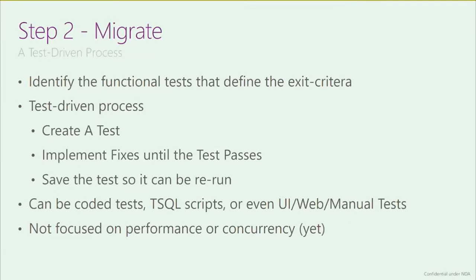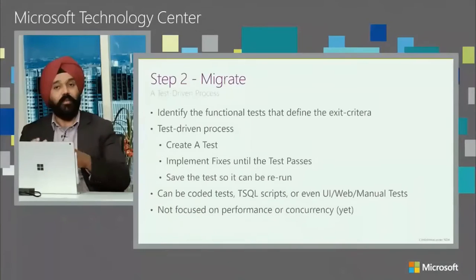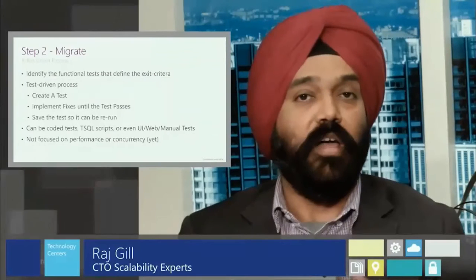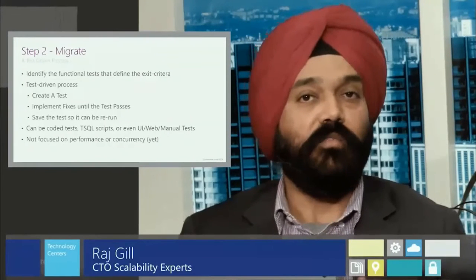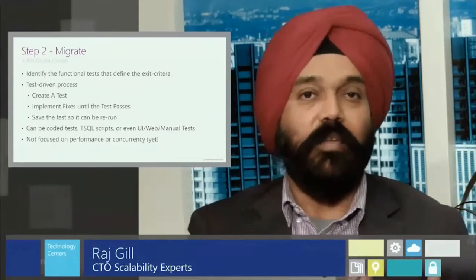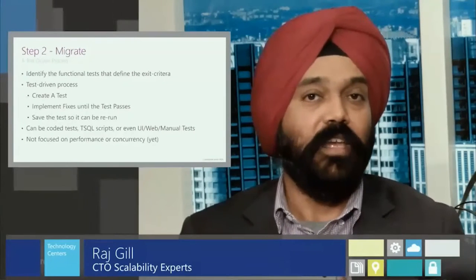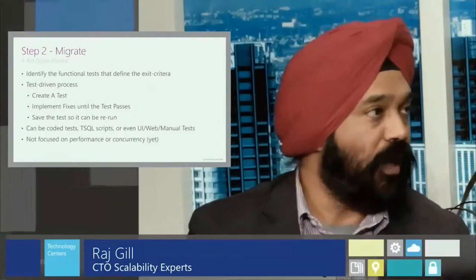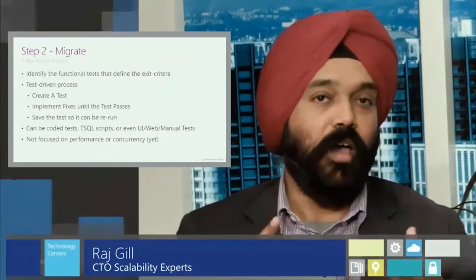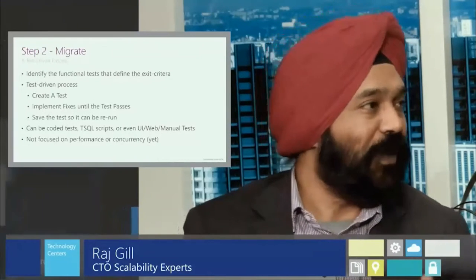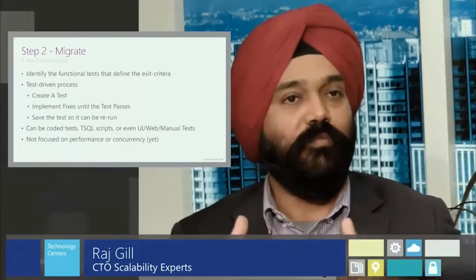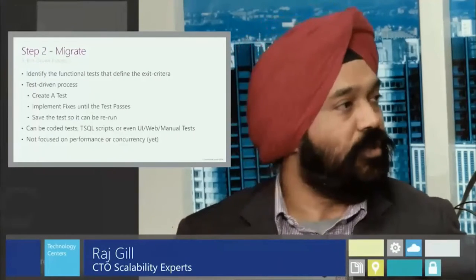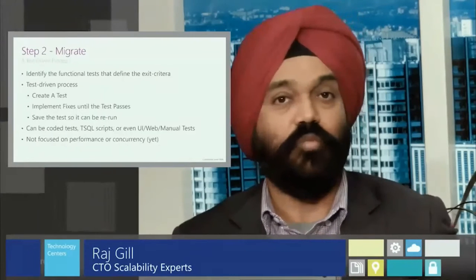Now we're going to actually start planning how we're going to migrate these applications and databases from Oracle to SQL Server. And the very first step is that you want to define how you're going to test your migration. Because one can claim that you've migrated something correctly, but unless it's fully functional, the application is working correctly, the performance is really good, and all the SLAs are met, your migration isn't complete. So in this step, you're really planning how you're going to validate and test that migration. So the testing plan is what comes out of this step.